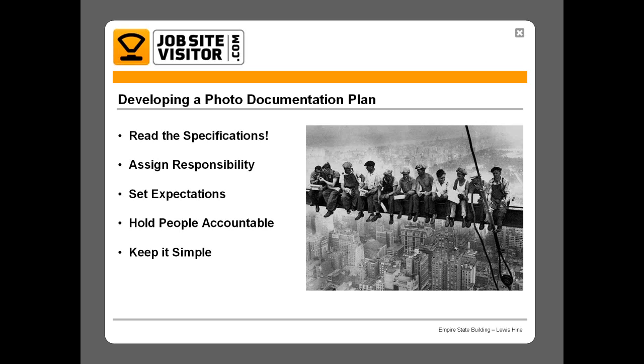In this submittal, you'll want to put together plans showing where you're going to take progress photos from, and these are photos that you'll take on a regular basis. Indicate how often you're going to take photos, the quantity of photos you're going to take, all those types of things, the camera you're going to use, so there's no surprises.